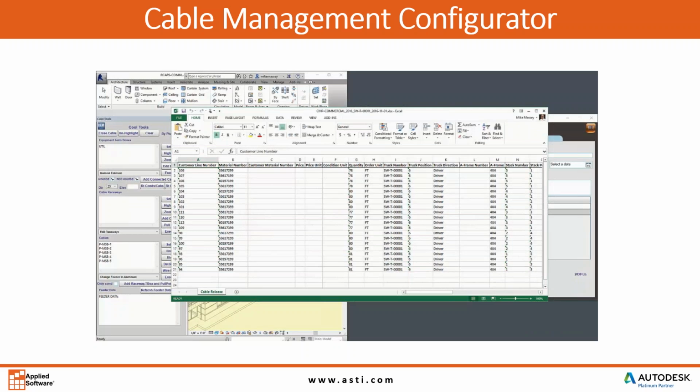Southwire once told me that the slowest part of ordering cable is the manual entry that they have to do to manually enter all the information in for the order on their side. And so this is giving them a spreadsheet that they can input straight into their system and do this process a whole lot quicker and get it to your job site quicker. So again, a very, very powerful tool that you can use in the ordering process of your cable.